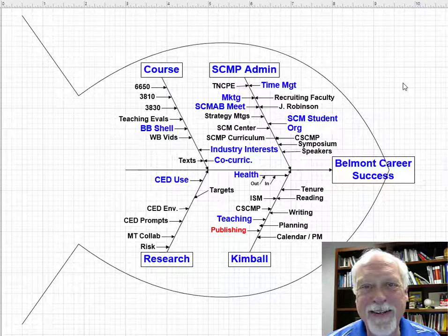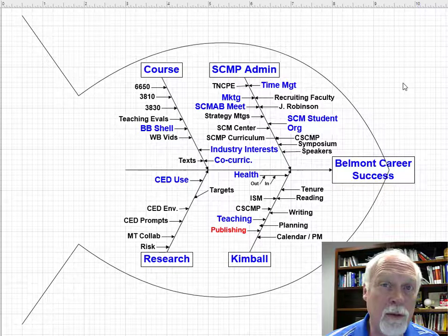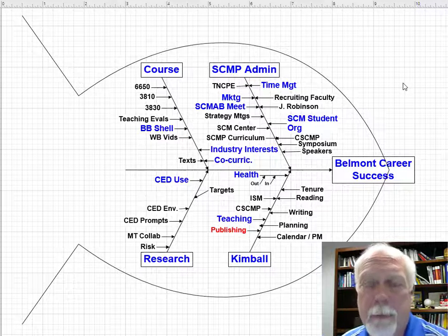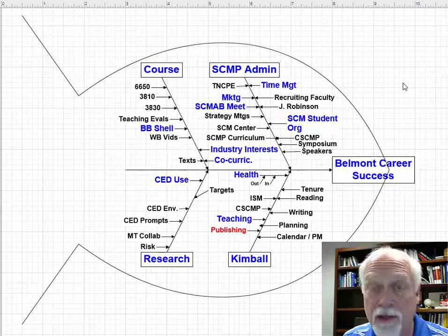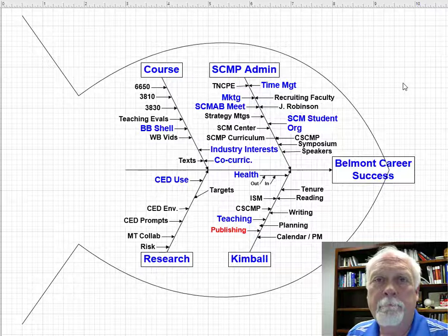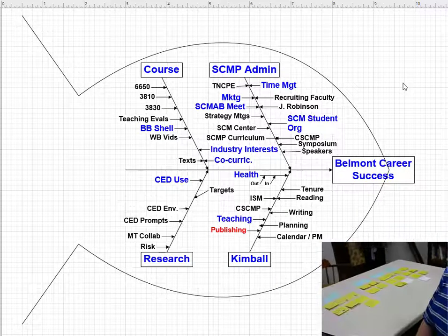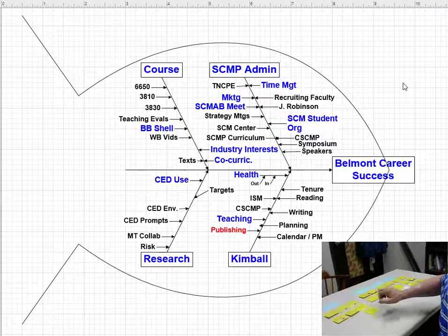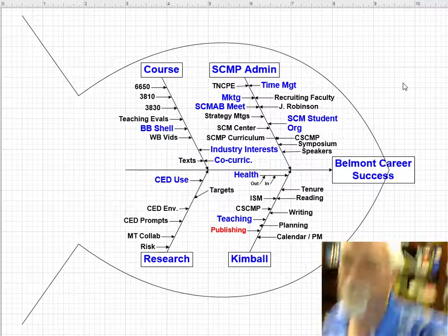It may look like I'm looking at a cause and effect diagram, but I'm really showing you at least part of the process that I use to create a work breakdown structure. And the first thing that I did was essentially what I call a sticky storm, but a one person or individual brainstorm. I just use sticky notes here on my desk and put a big pile of them out here, and then sorted them into groups. So that's called an affinity diagram.